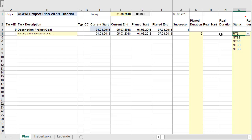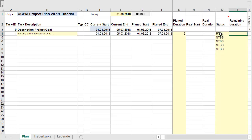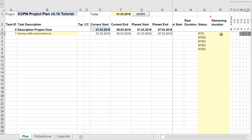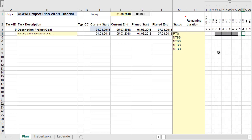On the right side you see execution control. This task is ready to start because it's the first one, and there's a remaining duration shown. In the Gantt chart, the gray bars represent the planned bar — five working days means seven calendar days: two days in this week and three in the next. Small dots or hyphens indicate the shortened critical chain plan.